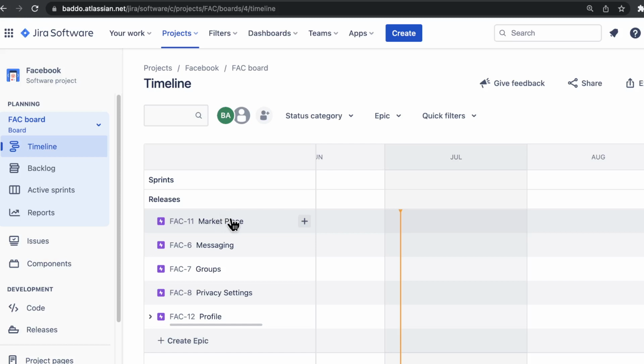We are only going to talk about how the user wants to use it and the reason, the expectation. That's why we have this format: as a user, I want to, so. As a user, that's the persona. I want to, that's the purpose. And so that is the reason or the benefit.